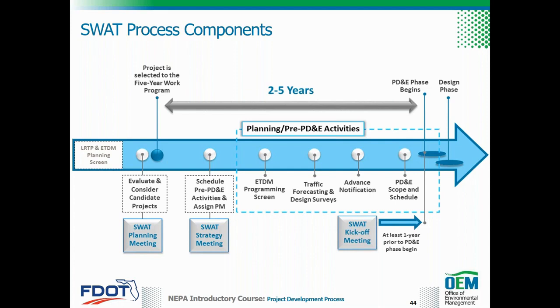Typically, when a new project is added to the FDOT 5-year work program for a PD&E phase, it is programmed in the new 5th year. The SWOT process engages and continues project development in those waiting years before the start of the PD&E phase.